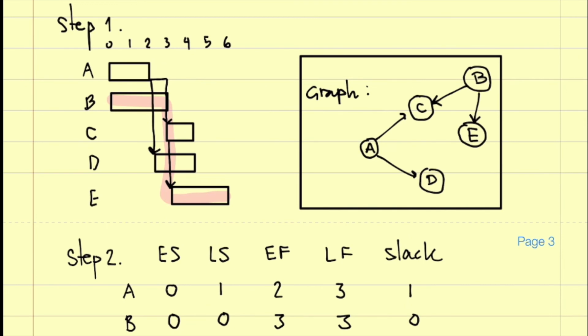Yeah, so the critical path is a list of work packages that are critical. That if those work packages get compromised, get delayed for whatever reason, your overall performance is going to be delayed. Okay? So those work packages are critical because of that. So you want to focus your energy on not delaying those work packages. If you have a lack of resources on A, it doesn't matter because you can delay A by 1 week or 1 month, but you cannot delay B by 1 week or 1 month, because if you delay B, everything gets off track.